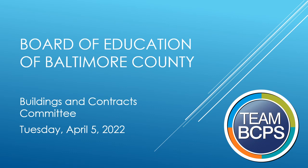All right. I do want to clarify for this bid as well, because if it was just one bid and they can provide the different services, they do team up because you have to follow procurement laws. It's an open market where you bid out, and they all have to be pre-qualified vendors that come into the Maryland marketplace. So the free market takes its place. If they can do masonry, they're going to team up with a company that does masonry if they won the bid. Yes, being that we're bidding this by individual trade packages, for this particular one, if they were not a steel company, they just simply wouldn't bid on the steel portion of this work.